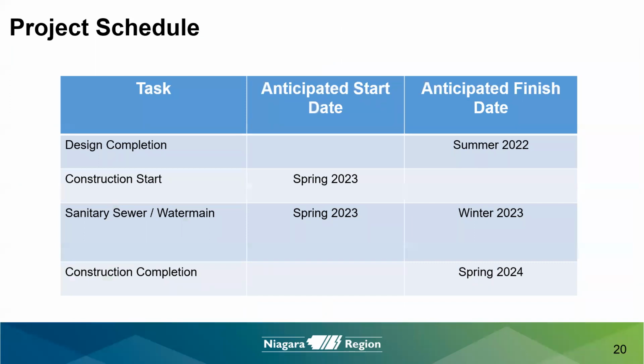Project schedule. It is anticipated that the design phase will finish in the summer of 2022, with construction commencing in the spring of 2023 and ending in the winter of 2023. Sorry, ending in the spring of 2024.